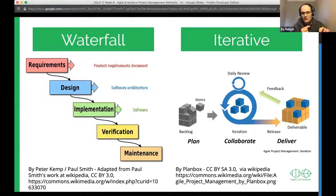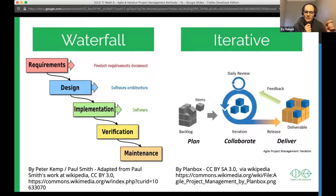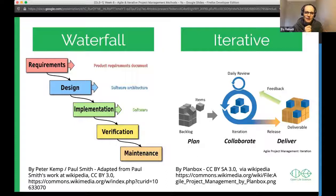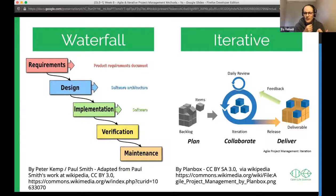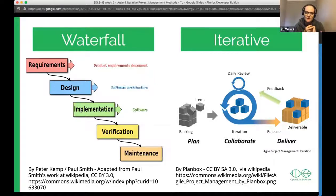In waterfall, you implement requirements and then verify that what you implemented works according to the original requirements — not necessarily what the customer wants. It's called waterfall because it's very rigid: you flow from one step down to the next and can't go back. Over a three-year timeline, you might spend six months gathering requirements, two years designing and implementing, then a final phase verifying. If you misunderstood requirements, there was no time to go back, and the result was often to specification but not what anyone really wanted.